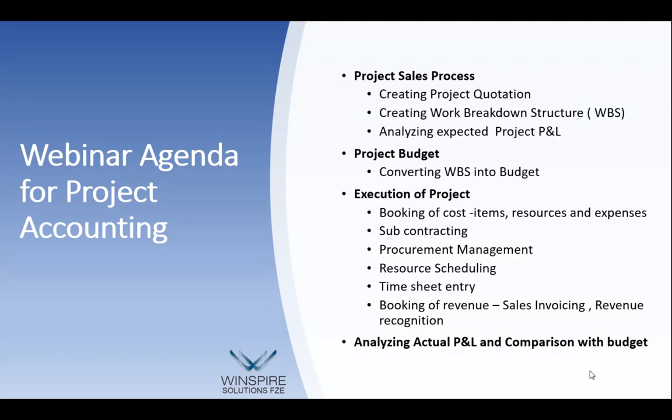All those things are analyzed, and this is internally sent for a workflow approval before we submit the quotation. Then the quotation can be submitted to the customer via email, or printed and submitted. Once the quotation is approved or revised, you can do the revision. Once it is approved, it gets converted directly into a project budget. A project budget and a project file are created.